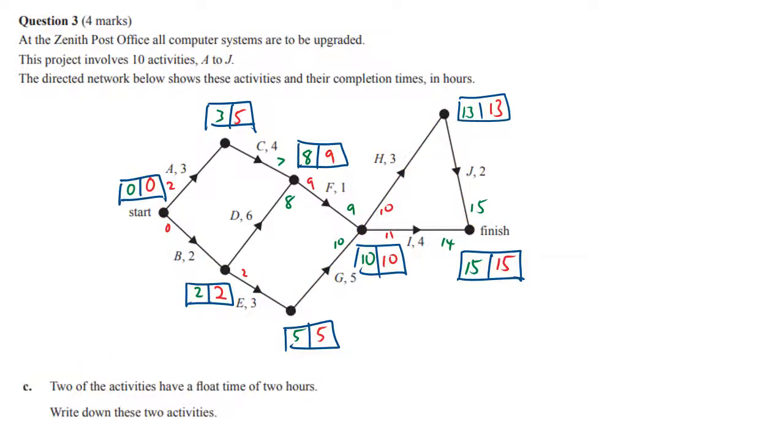Now we're looking for two activities that have a float time of two hours. The only place we can see a difference of two in the boxes is this one, so we might think there's a float of two on C. As I've pointed out in other videos, this float technique doesn't always work brilliantly, but let's isolate C. I'm going to write C comma four.